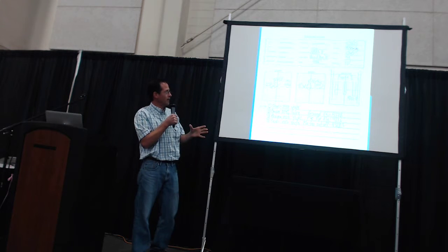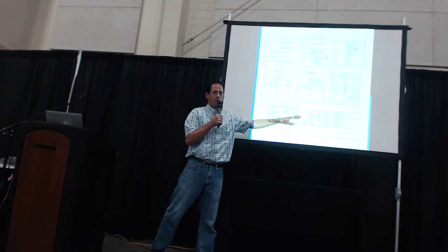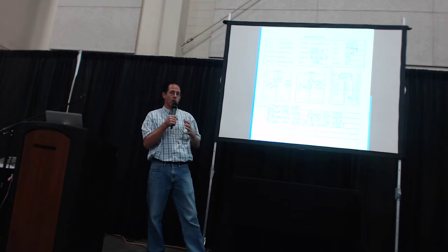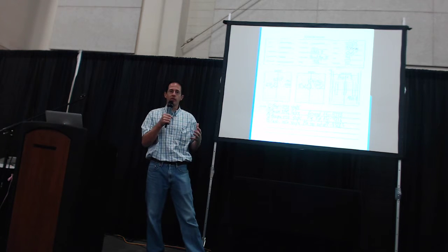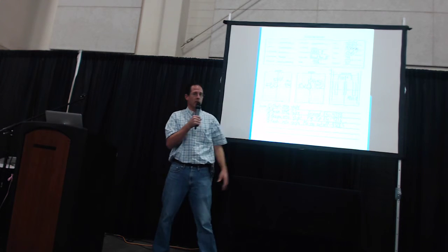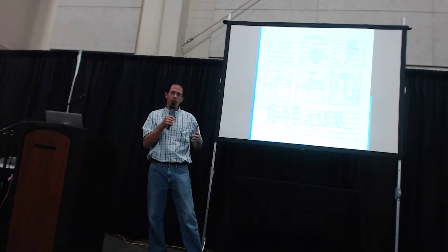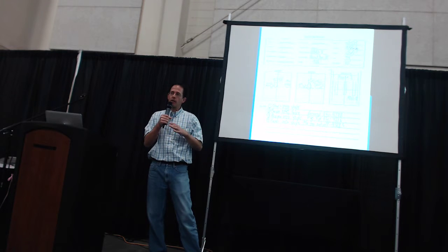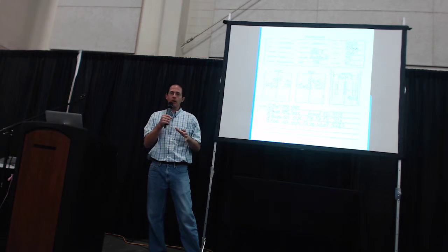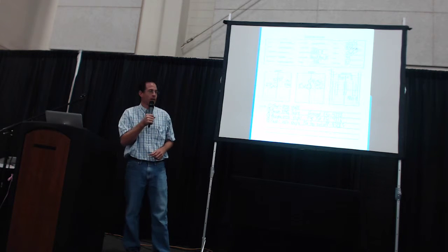When it's all completed, you measure the plumbness and the pile location. There are penalties that apply if either of those values are too far out of requirements. For the pile center, they can actually be up to 6 inches out without any penalty. And then the penalties start to kick in. If they're a foot out, then not only do they not get paid for that pile, but it has to be analyzed to see if we need to drive another pile or what exactly needs to be done.